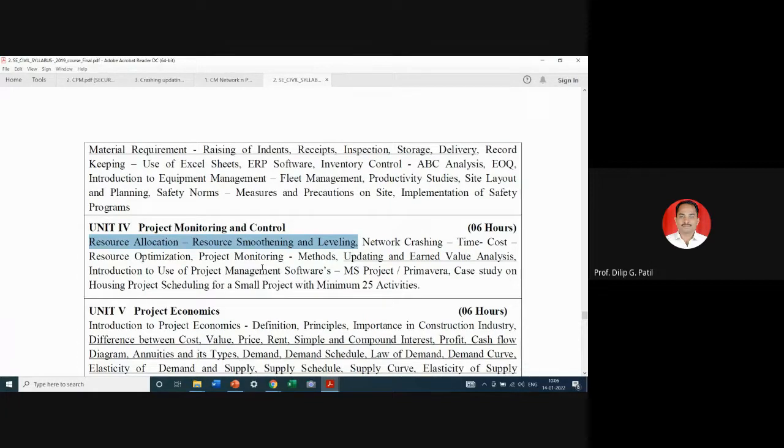So this condition highlights that we cannot have the labor count in such a fluctuating manner, and we have to stabilize the requirement to a certain extent. Instead of 150 on one day, 100 on another day, and 0 on the third day, we can have a constant requirement of 70 to 80 or 100 laborers.